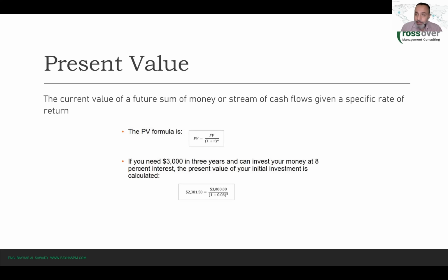The most important thing again is to know that if you have 2 projects and one project has a present value that is over the other project's present value, then you select all the time the project with the higher present value. Okay, I think it makes sense, right?